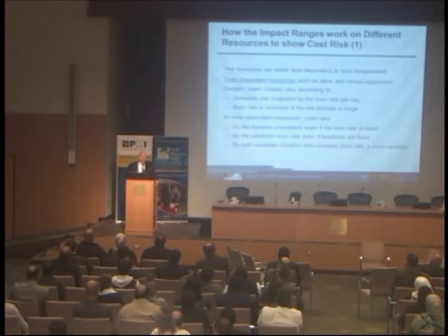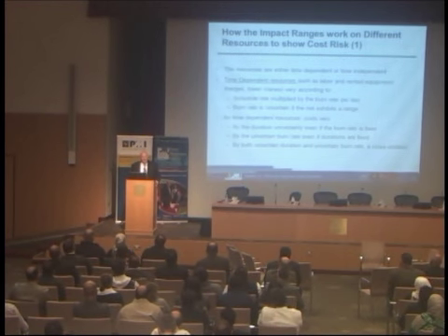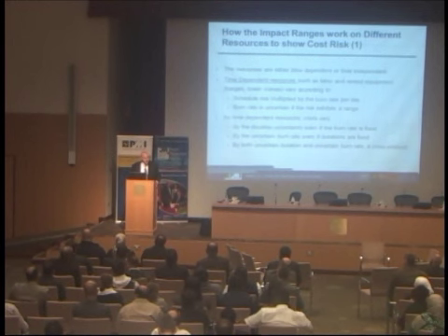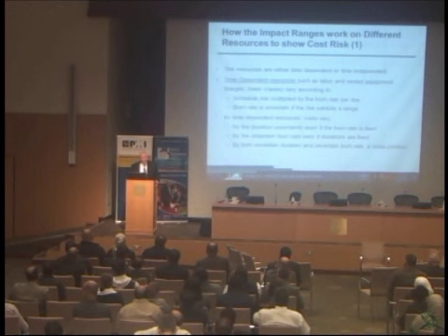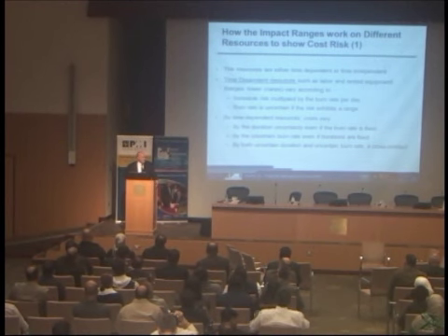And in fact, some of my colleagues in Australia just use two resources, time dependent and time independent. We're not putting resources on the schedule to manage resources. These are not detailed enough to do resource leveling or anything like that. It's to get the budget on the right activities. Now, somebody else says, well, I can't load at the activity level because my cost budget is not that detailed.